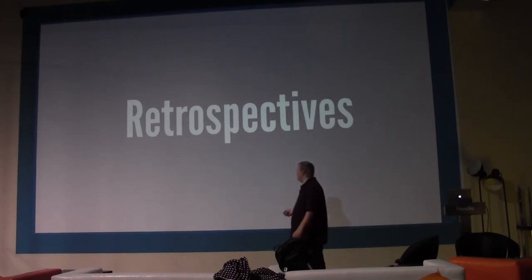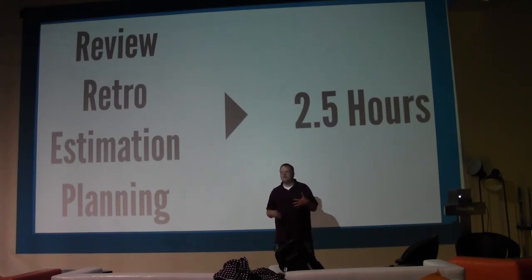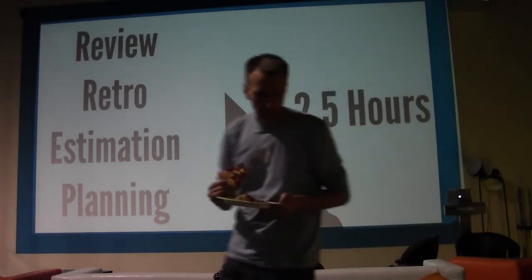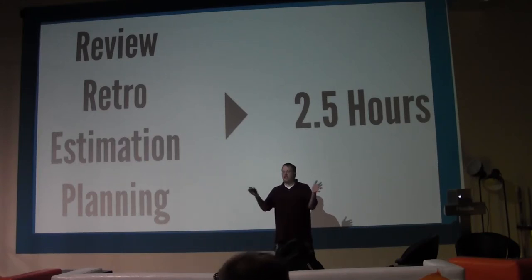So for us, these estimation meetings, held the day before our planning meeting, are probably the most critical. We'll go in and estimate, and we'll ask questions, and it gives the product owner an opportunity to see what things would take. If he thought a feature might take a day or so, and we say it's going to take about 4 days, he can then decide whether he really wants that this week, or wants to wait, or change the scope.